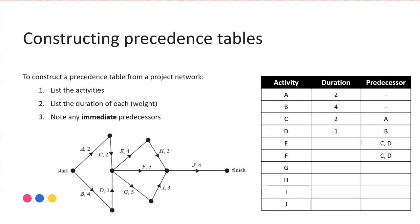Here's an example of constructing a precedence table from a graph. The things you want to look for is making sure that all of the activities in the network are represented, going through generally in some sort of alphabetical order, and making sure you've got all of the activities listed in the table. The next step is to note the duration of each one. So remember the duration is just the value that is on the edge next to the letter for that particular activity. So activity E has a duration of 4, F a duration of 3, G duration of 5, H 2, I 3, and finally J 4.